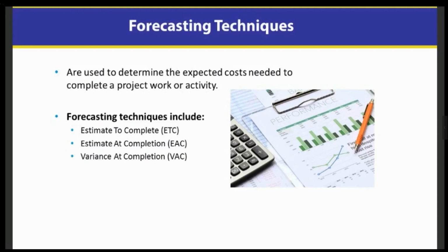Now, another thing associated with forecasting techniques is resource leveling and then reducing the scope. So we talked about crashing and fast tracking. Two other things that we can use is reducing scope, which no sponsor or customer ever wants to hear. But if we have a hard and fast timeline, like for instance in the IT world, I may have to upload what we have on a particular date because that's the only date that we're allowed to upload information or new processes. So if that's the case, then I may reduce the scope so that we can go ahead and go forward with what we have.